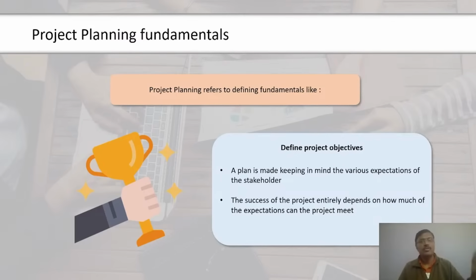There are various terms used in earned value technique. Planned value is the authorized budget assigned to the scheduled work. Earned value is the work performed in terms of budget authorized for that work. Actual cost is the cost incurred in work performed. Budget at completion is the budget amount for the work. Estimate at completion is the expected total cost of the project. Estimate to complete is the expected cost to finish all the remaining project work. Variance at completion is the projected budget surplus or deficit at the end of the project. All the parameters displayed on the screen are measured in terms of cost.